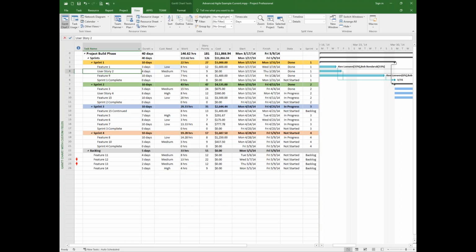Well, as Shane's describing, we're talking about primary keys and foreign keys, right? We're saying, hey, I can link this system to that system as long as I know what the connection point is, and that's that unique ID, what they call the work ID, that comes between the systems. So the short answer, Ken, is yes, you can synchronize a single Microsoft Project to multiple TFS projects, or multiple projects to a single TFS. The idea is you can mix and match: you simply pick and point the schedule to what it's connected to.